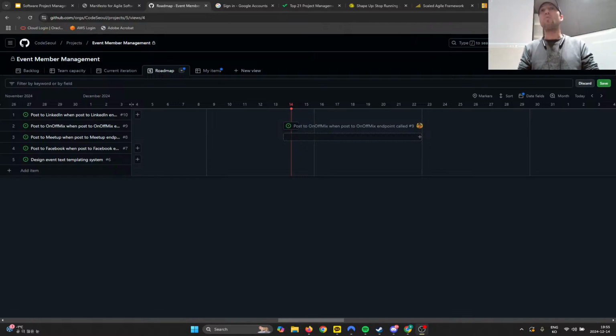Jira tickets. When in the process? Planning. During planning. Yes. Interesting. Okay. Because theoretically, if they know what their test cases are, they should be able to estimate their test case time. And if they're able to estimate how long their test cases take, you should be able to include that in the sprint plan. That's right, but also because there are separate teams, they have incoming tickets and other tests